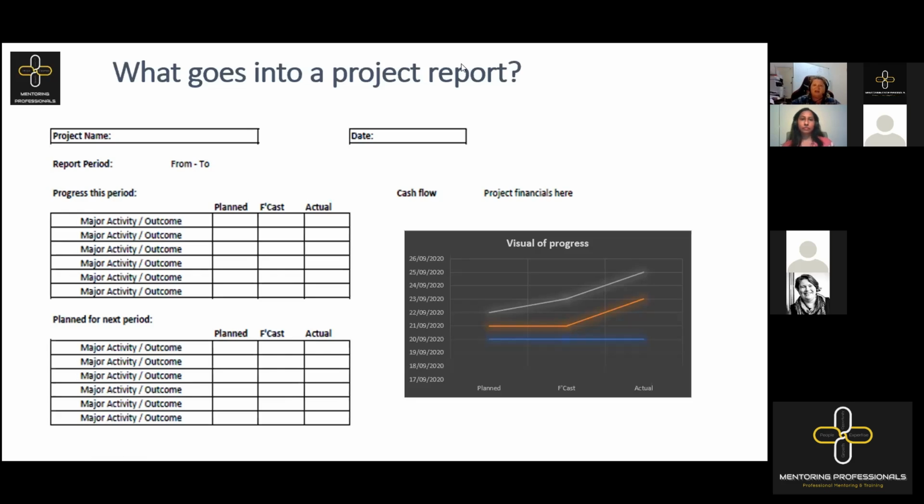Now, I just had a quick question come up there. So, Dewan, absolutely. You're quite right. It should be part of the communication management plan or your communication strategy. However, it's not always in there. Your communication plan and your communication strategy should actually be looking more towards your stakeholder engagement. And you're not wrong, your project board is part of that stakeholder engagement. But all of your risk strategies, your change control strategy, your issue management strategy should also contain who those escalation pathways are.